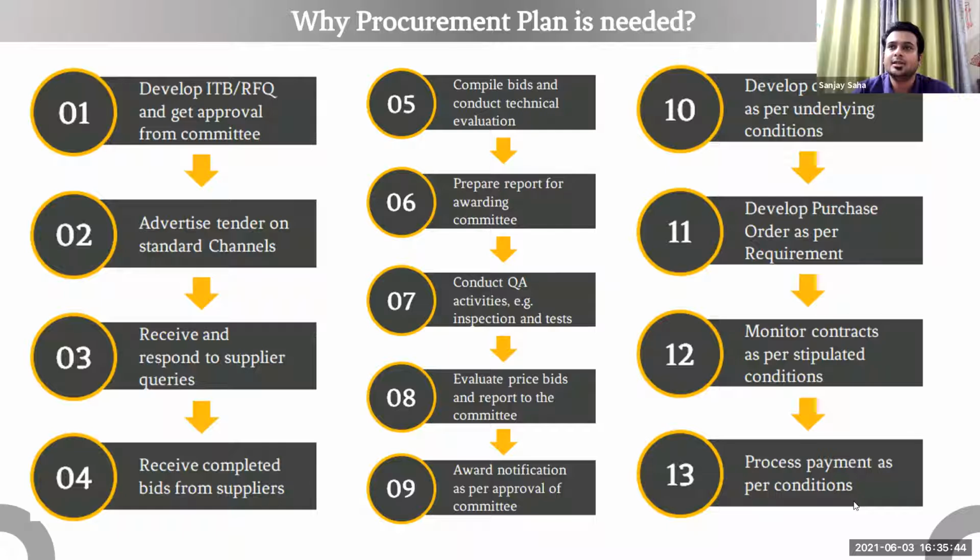Along with, of course, another big chunk of time is when the manufacturer is actually manufacturing the products. But procurement still takes a big chunk of this entire lead time. That's why we also have another term which we call procurement lead time. It is the time period between when the procurement team has received the supply plan until they have raised the purchase order. If we can calculate that time period, then we know how good or weak the procurement process is of the organization or of the country.